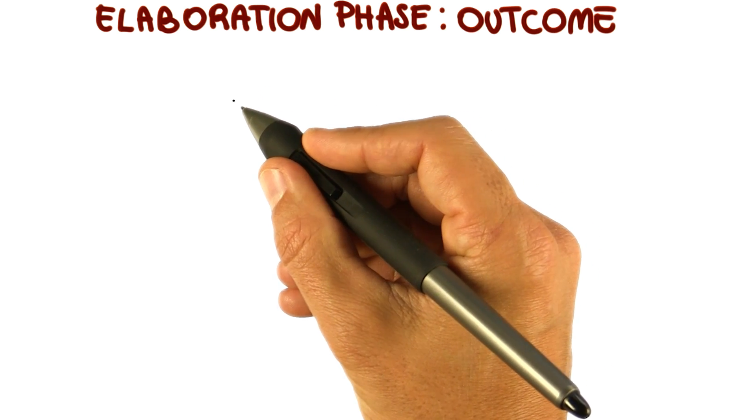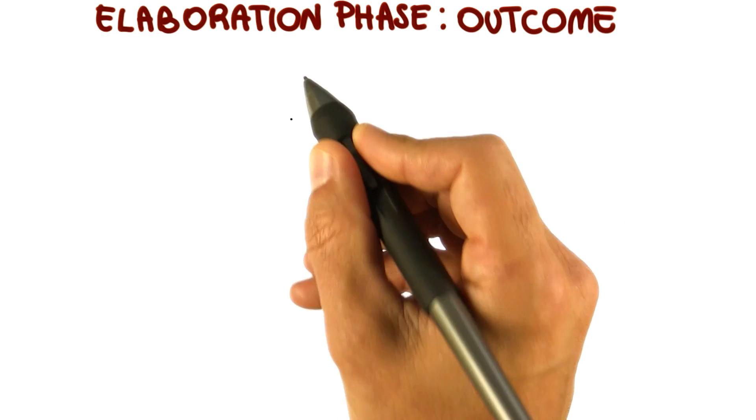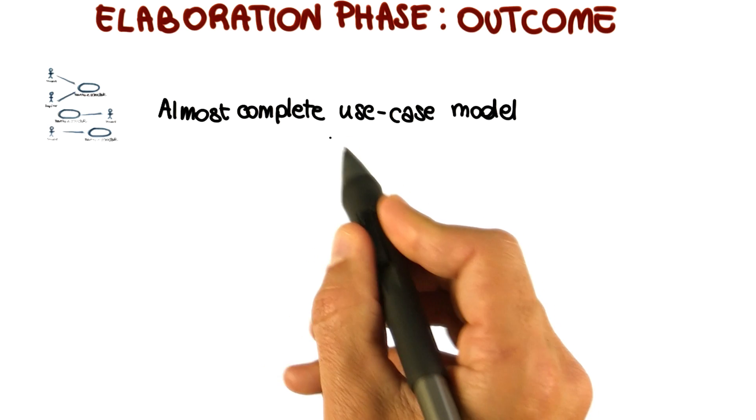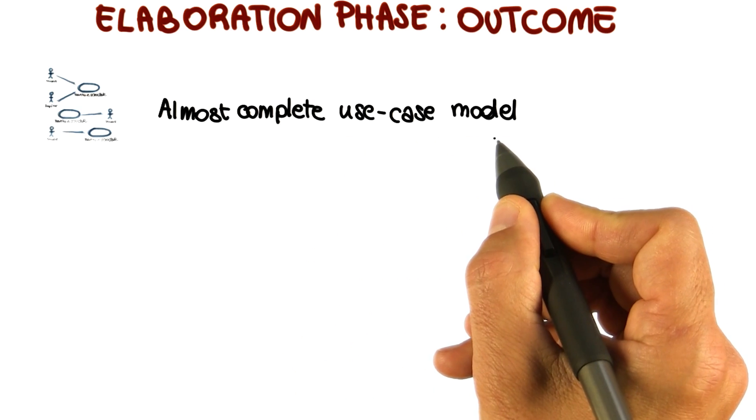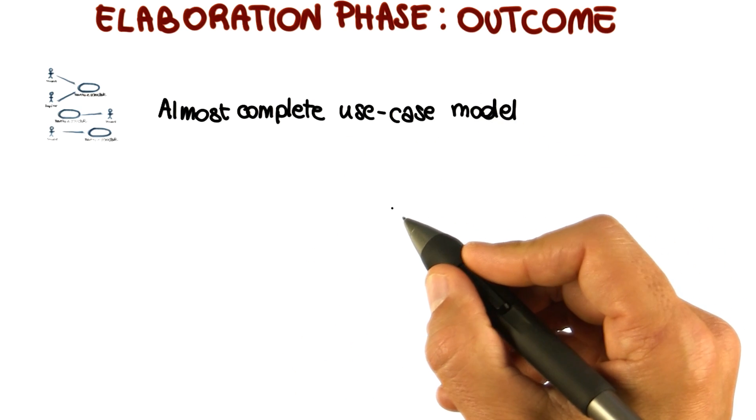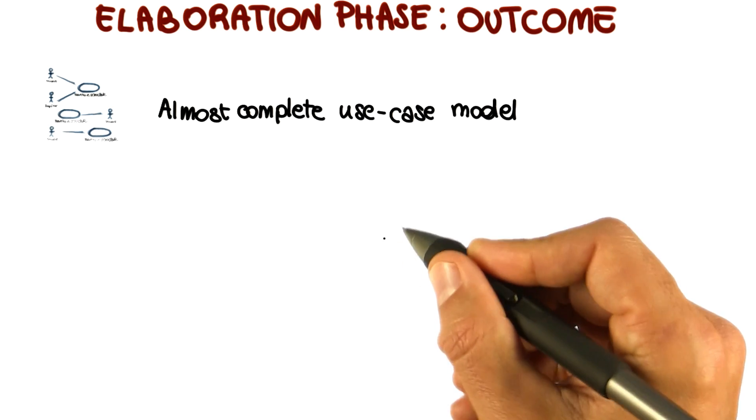The outcome of the elaboration phase reflects these activities and produces several artifacts. The first one is an almost complete use case model with all use cases and actors identified and most use case descriptions developed.